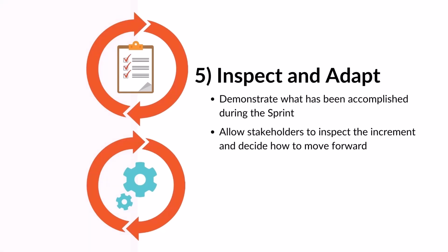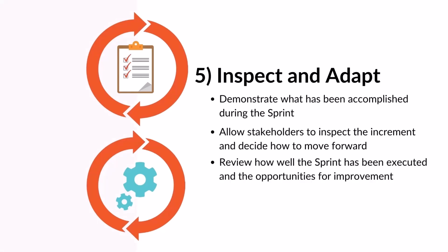Finally, in the sprint retrospective, the development team, along with the product owner and Scrum Master, review how well the sprint was executed and what the opportunities for improvement are. These improvements could be process or technical.